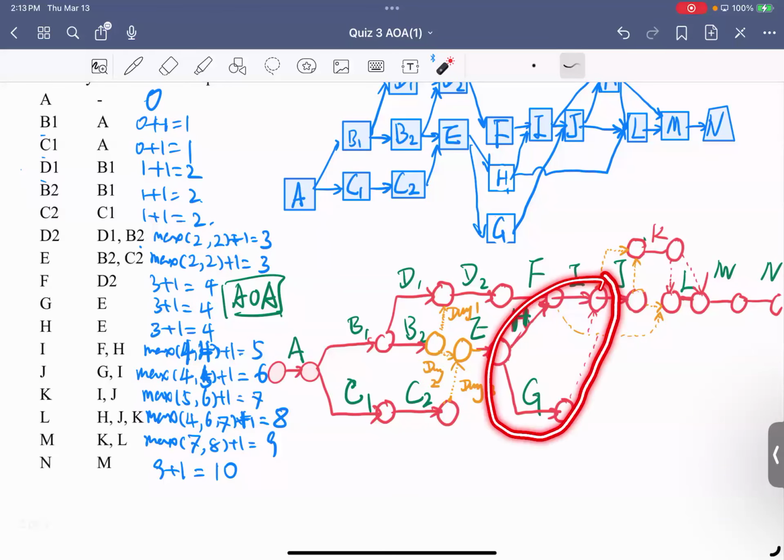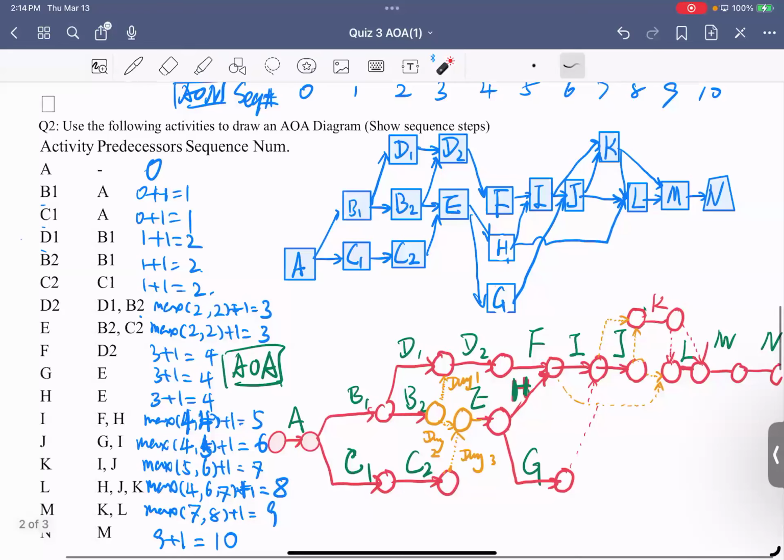So how can we do this? J to this, G to J. Right now we're using a dummy here. My question is, do we need this dummy? Or can we just, yes, we do, because that means G would also go to K. Without the dummy, we can directly do this. Does that work? Oh, yeah, actually, yes. Would we create a new relation?